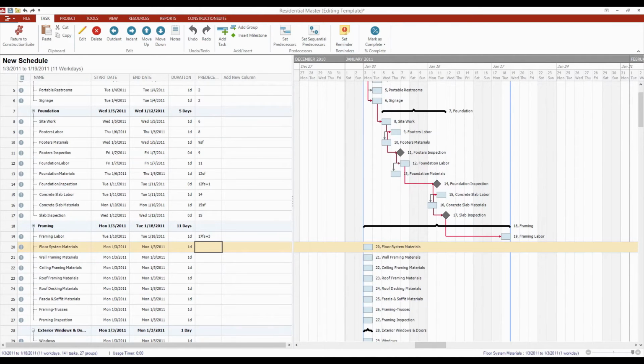Now we've got this additional set of materials, and just like with everything else, we want to make sure that everything is on the job site when we need it. There could be various different delivery times that you build into this, but I'm just going to make sure that it all gets set up at the same time. This template has a lot of different materials in here, and you don't necessarily have to use them all like this. You can always just turn this into a single task if you wanted to, and maybe just change the name of the first one, then delete all the extra ones and just call it a framing package or something like that.